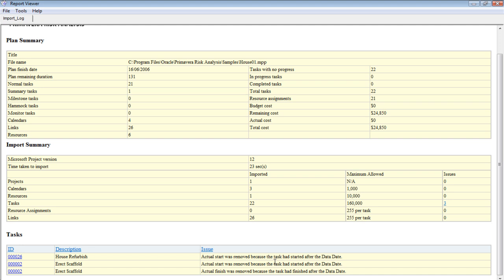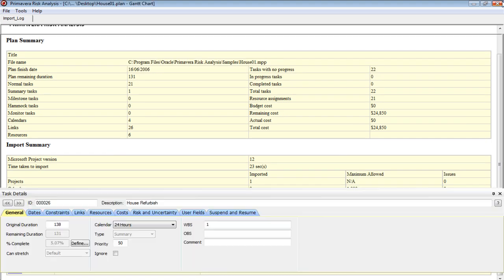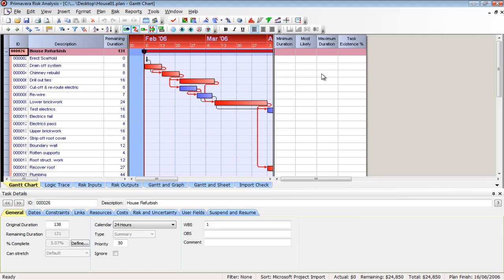So items like that the scheduling tool and a risk tool just cannot handle, that's what's handled in this import log. And each one that you find on critical errors, you really need to go back to the original tool, fix the issue, and then re-import. Some things like small rounding and things like that, maybe you can progress and go on with the analysis, but some of these it will actually change the entire configuration of your schedule network, so you don't want to do that.